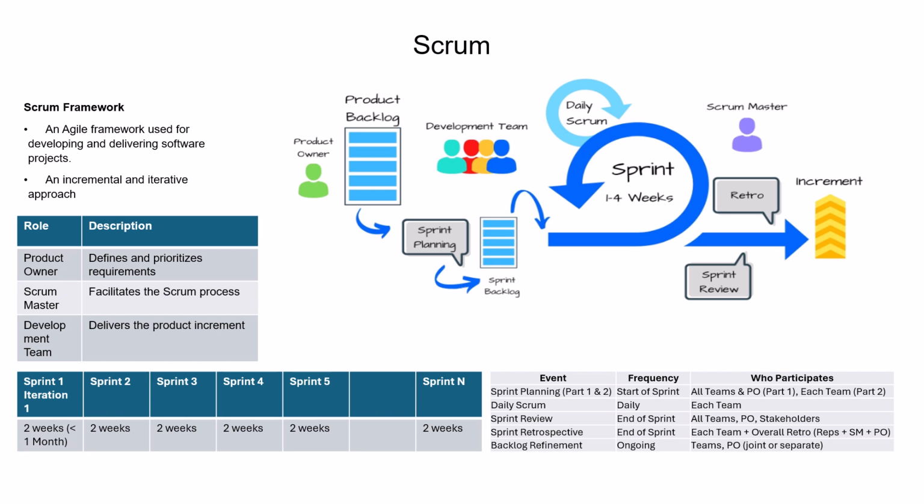The disadvantage of the waterfall model, which I mentioned earlier, is that you have to wait all the way until you finish all of the requirements. Maybe you develop the software in 9 months or 6 months or a year, and only at that time do you show it to the customer. The customer sees it and says, well, I didn't like this, this feature shouldn't work this way. So it becomes very hard to change the code, because maybe we have hundreds or thousands of lines of code. This is why agile is very powerful: we bring the customer in after each sprint, show them what we developed, get their comments, and then make the changes as needed. So this is a key thing with respect to Scrum here.